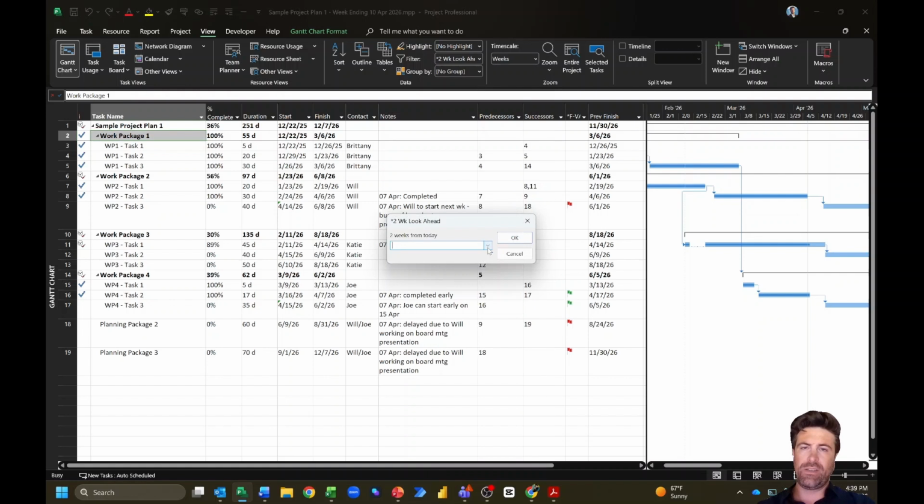I'm going to go ahead and click on that 2 week look ahead filter. And here's where those quotations and question marks came into play that prompt the user for input. So you can see here, anytime this filter is run, you're going to get a pop-up, which makes you choose a date, right? 2 weeks from today, really easy. You just use the little calendar tool here. You move your mouse down by 2 rows and you don't have to do any calculation.